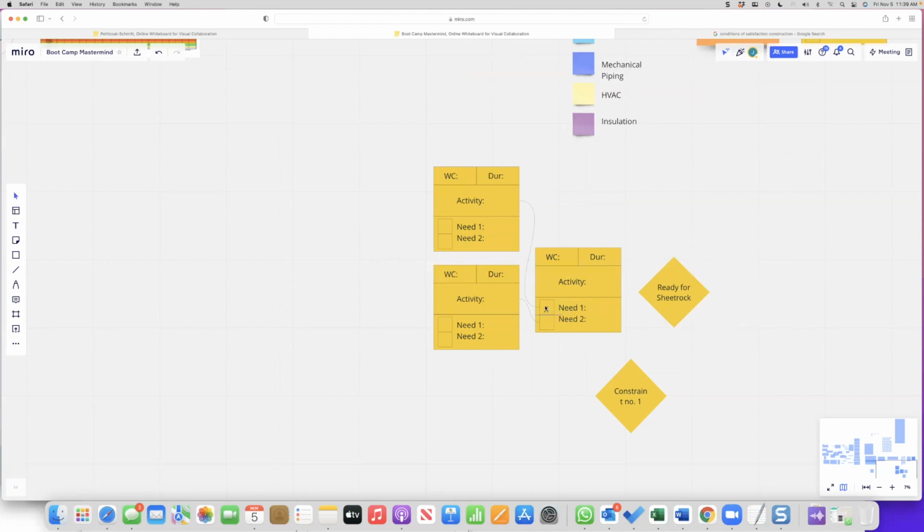And as I see that these needs down here are X'd off, then I know, okay, this one's done. The person that just put this sticky up can go sit down. And now the person that put that sticky up can ask for what they need, and you just start populating it to the left. The reason that's impactful, in my opinion, is because it allows you to know that the sequence is being built in a complete manner. Meaning once you're done checking off those little need boxes, you know that you've exhausted your sequence. Does that make sense?